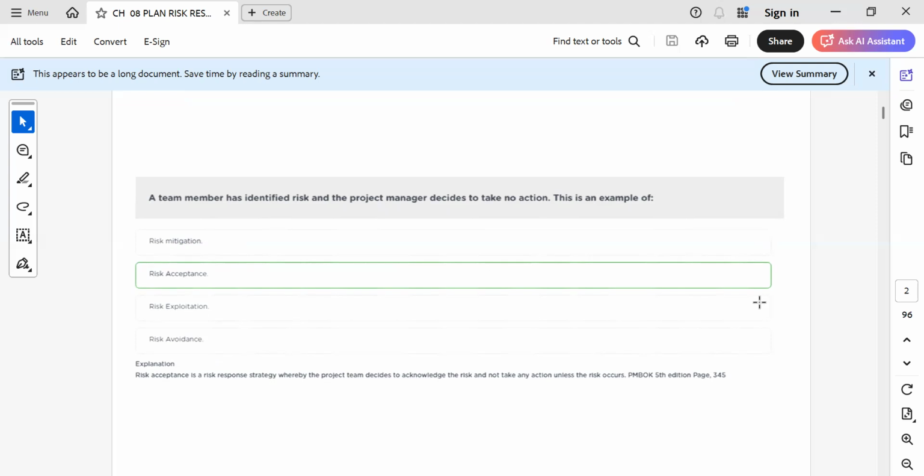Because if there is a probability and an impact, and I make the impact zero, then I am trying to avoid the risk. Or you can make the probability zero. Either way it works, either making the probability zero or the impact zero. If the question states that he is trying to make the impact or probability zero, then it will come under avoidance. Yes, true. Okay.